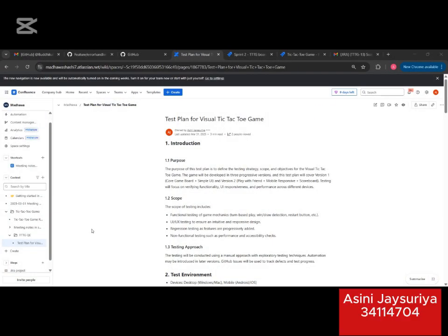Hi everyone. Next I'll explain how testing was carried out in our project. In our project, testing was conducted in parallel with the development, following agile best practices. For example, in sprint 1, our main focus was on setting up the basic features and gathering requirements. During this phase, we also created our initial test plan and began drafting test cases alongside the development.